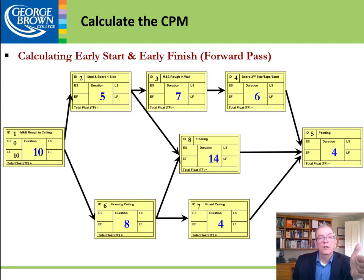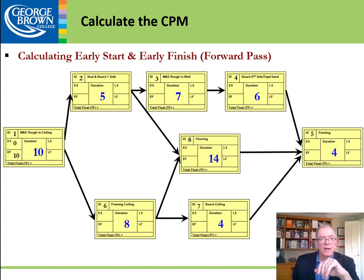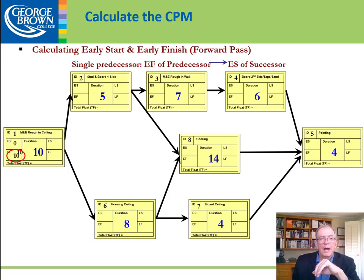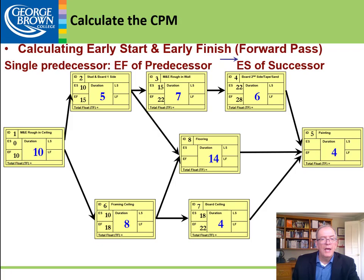We're working on the forward pass — remember we have to do both the forward pass and the backward pass. Assuming you've reviewed chapter 3, on the forward pass the 10 becomes the early start for stud and board one side. We add the duration of 5 days, so 10 plus 5 is 15, and 10 plus 8 is 18, giving us those early finish values.